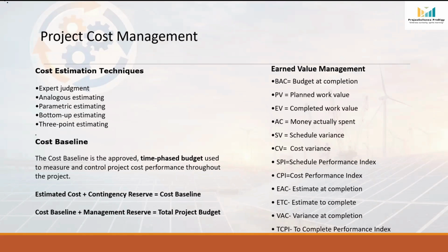Now, let's understand one of the most important concepts in project cost management, which is cost baseline. PMI defines the cost baseline as the approved and time-phased project budget that is used to measure and control project cost performance throughout the project life cycle. The cost baseline is simply the approved budget for executing the project. It becomes the benchmark against which the project manager compares the project's actual spending.